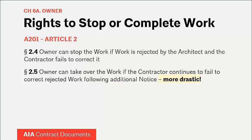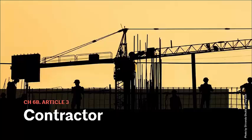Stopping work and taking over the contractor's work is really serious — as Kevin says, we're now entering nuclear war territory. Here, as elsewhere in the general conditions, when drastic steps are required, you'll see an escalating series of actions, required notices, timeframes, and multiple opportunities for the non-performing party to correct the problem. But if things get as far as the owner taking over portions of the work, this effectively creates the contractor's default to their obligations, and it's a symptom of much larger problems.